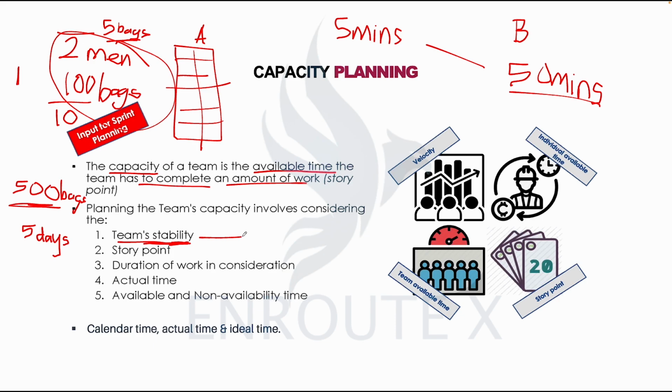That is where the question comes, who is available in this sprint? You know, we're planning for the sprint. Capacity planning happens in Scrum at the beginning of the sprint. So the team would come together to say, I would only be available 3 times in the week because I have a doctor's appointment, or my son has a football match that I need to attend.